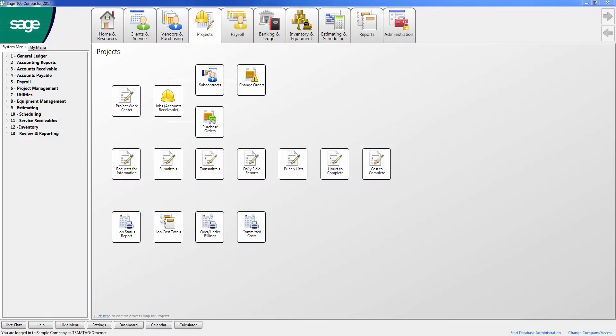In project management, you can process and track all your project related documents, such as RFIs, submittals, transmittals, daily field reports, and punch lists. You can also manage all your committed costs, such as purchase orders and subcontract agreements.